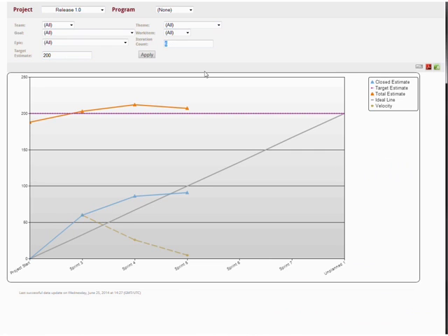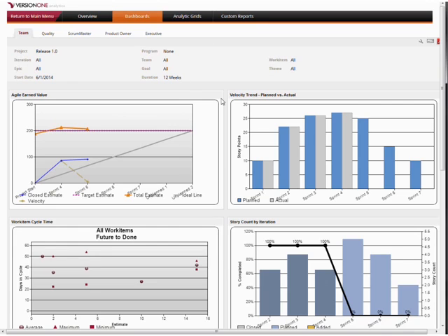Actually, I'm going to open this up large again just to show you 2 important configuration parameters. The first is the target estimate that you can set. The second one is the iteration count. So we calculate defaults based on start and end dates, but if 6 isn't really the right number, maybe we need 7, the x-axis will account for iterations that are unplanned.